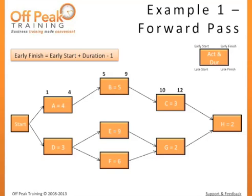Let's move down to Task D. This task can begin as soon as the project begins, so its early start will be the beginning of day 1. Using our formula, 1 plus 3 minus 1, the early finish is 3. Since Task E depends on D, it cannot start until after D's early finish, or the beginning of the fourth day. Using our formula, 4 plus 6 minus 1, the early finish is 12. Task F also depends on D, so it cannot start until the beginning of the fourth day. Using our formula, 4 plus 6 minus 1, the early finish is 9.